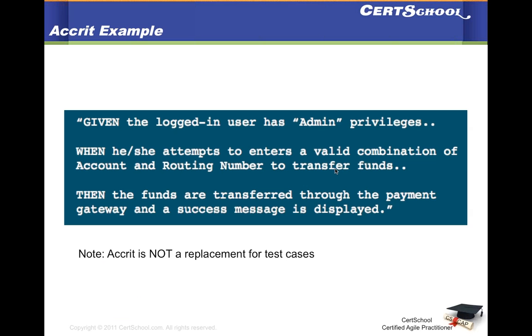you can decide to pull one of the top stories in the backlog at that time and run it in the running sprint. Or you may pull that story in, but not commit to finishing it in that sprint itself, so it'll become a head start for the next sprint. Okay, so you'll have to adjust your remaining estimate in that story, which is a head start in the next sprint. Okay, so there are agile tools available which will allow you to accurately calculate the remaining estimate for the whole sprint, even when there are head starts.